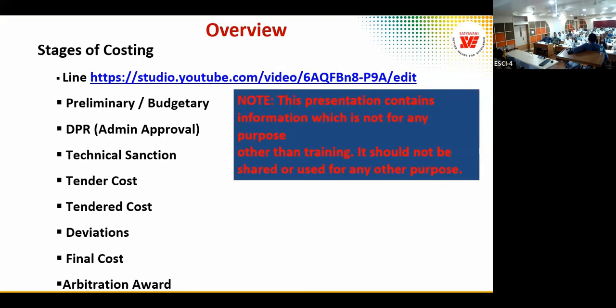That is possible because I, as a consultant, have a penalty on any variation between the DPR technical sanction cost and the actual final bill. Any variation, not reduction, not increase. Yes, for both reduction in cost or increase in cost.